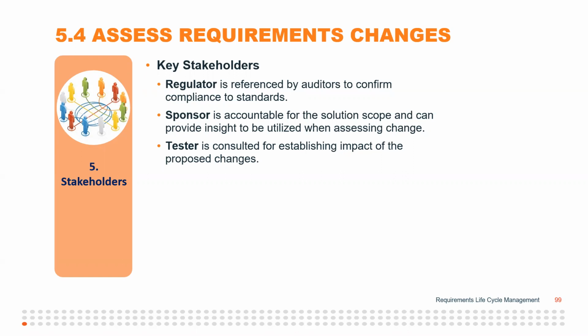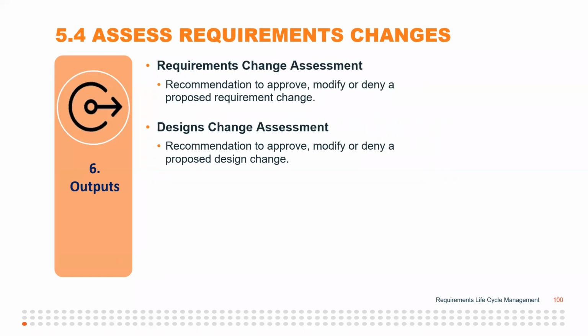Okay. All right. Now, the outputs are the requirements change assessment. So it's a recommendation to approve, modify, or deny a proposed requirement change, and also the design change assessment. And once again, that's a recommendation to approve, modify, or deny the proposed change to a design.